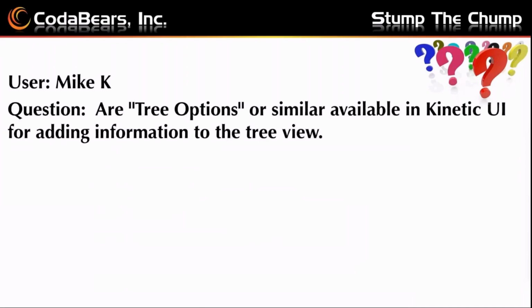I think you would have to do it from the project module to create the job for the item so that the two are linked. I think though, if you firm the job, from that point forward, you're telling the system you're going to manage it. So if either of them change and they're both a firm job, you would have to manage those manually. MRP is only going to fix it if it's still in an unfirm state.